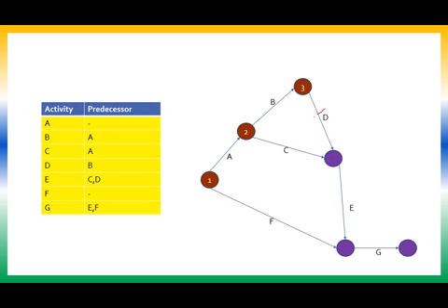Now delete the lines from 3, which will become 4. This is already deleted. So this becomes a new start event. So this becomes node number 4. Now delete the lines from 4. This was already deleted. This is also deleted now. This becomes the new start event. So it becomes node number 5. And lastly, delete the activities from 5. So this node becomes node number 6.